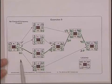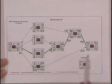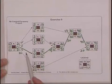So remember, add and choose the larger number going forward. When you go back, subtract and choose the smaller number.